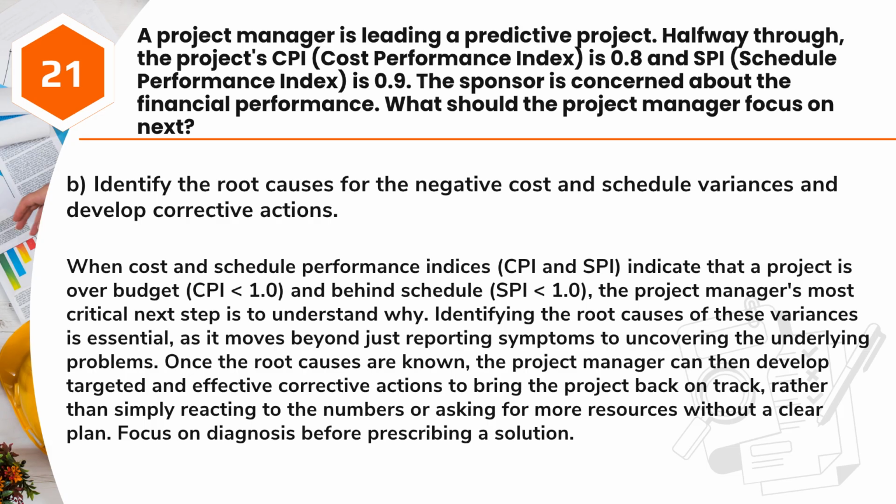Identifying the root causes of these variances is essential, as it moves beyond just reporting symptoms to uncovering the underlying problems. Once the root causes are known, the project manager can then develop targeted and effective corrective actions to bring the project back on track, rather than simply reacting to the numbers or asking for more resources without a clear plan. Focus on diagnosis before prescribing a solution.